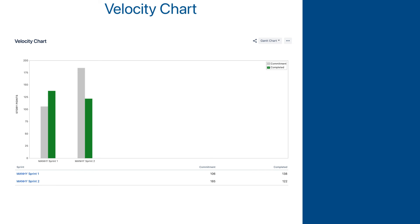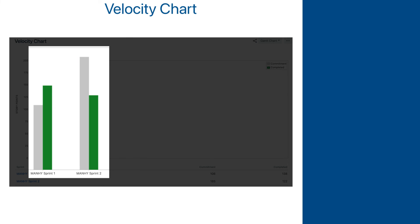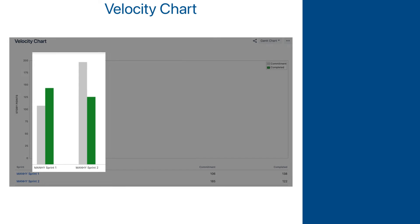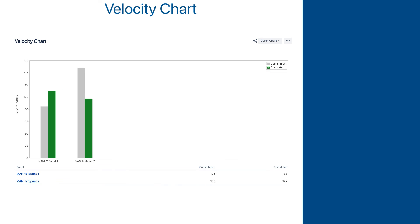Although it sounds like gross misplanning, it is actually an excellent example of solid agile planning. Why? Because the most valuable information that can be drawn from this report is that completed work was 138 points and 122 points, respectively. And those two numbers are not too far off. With this in mind, the team will likely assume their velocity is about 130 points and use that number as a baseline when they plan for future sprints.